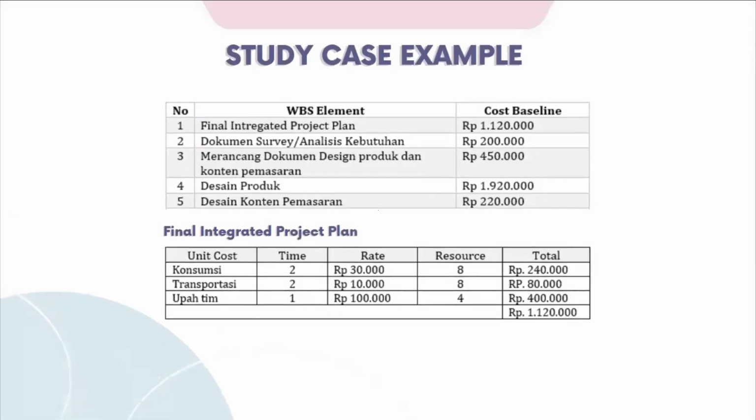Next, I will talk about a cost management case study. As you can see in the table, in the first step I plan to do the final integrated plan. Then in the table below, I break down the final integrated plan and then the cost I need during this step. The point is, you can follow the WBS element that you created before. From there, you can break down what is needed at each step.